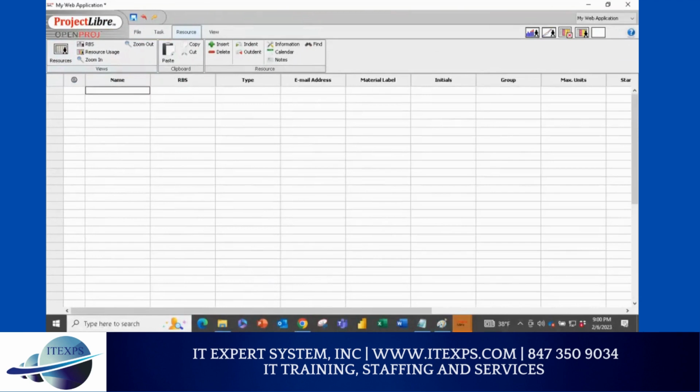So here normally there are two ways people write. If you know who is going to work on your project, meaning you already know the developer, the QA, the BA, the names of the people, then you can use them, not a problem. But many times when you are doing a project, you do not know who will be the person going to work. But you know that you're going to need 3 developers, 2 QA, and 1 database person. You might know that based on the work you have. So you can create them as a unit. This concept is pretty easy.